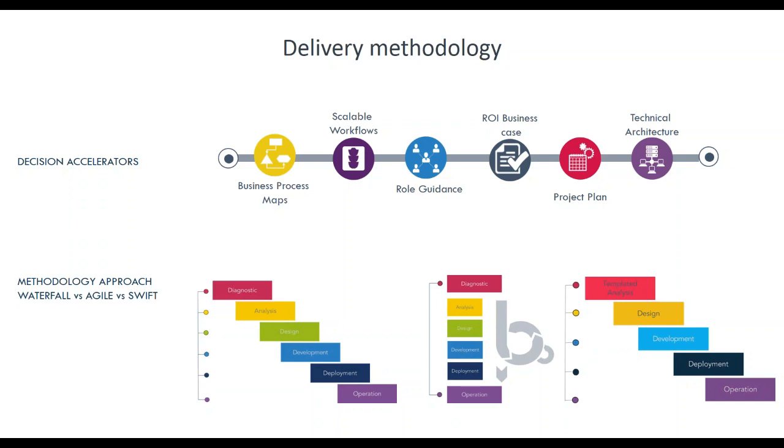Whereas Agile provides an iterative approach where the client receives a number of releases of the software as the delivery team builds the content of the agreed product backlog together. This can still be phased, but generally has short sprint cycles of 2 to 3 weeks, which make up the final delivery of the solution. This is often where you'll hear the term MVP, or minimum viable product. This is where time buckets are agreed in order to deliver the base minimum solution as quickly as possible.